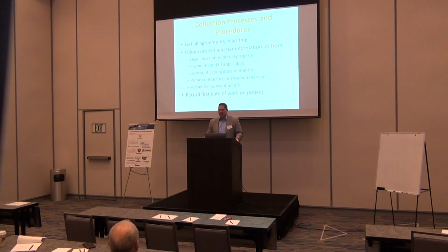And then the last thing I would say on just the collection procedures, the processes, is to know when you first started working on the project. That can be an important date in mechanics liens, and so recording that date early on, and it would really be the first day out on the site, can be helpful.